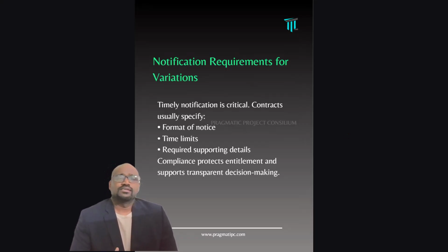So when you want to follow the contract and you want to counter the claim, better have an informal call with the contractor and say that you are submitting a claim. That is appreciated. But as per the contract, you have to submit this separately, because only then does it go to the track of the contract change management procedural committee. So better do that separately.